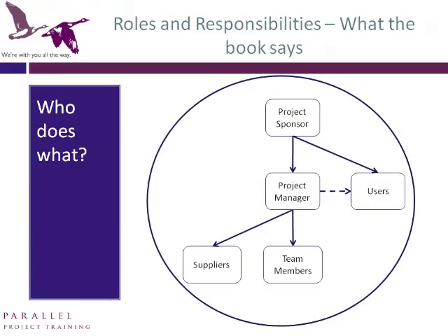The sponsor could be the project manager's line manager, but may not be, and certainly does not have to be. The team is managed by the project manager, and so are the suppliers. The latter of these, though, will have a contractual relationship with the project, and the project manager will, therefore, be managing them as a single entity, as opposed to the team members, who the project manager will manage individually. The management methods and techniques for each of these are clearly very different.